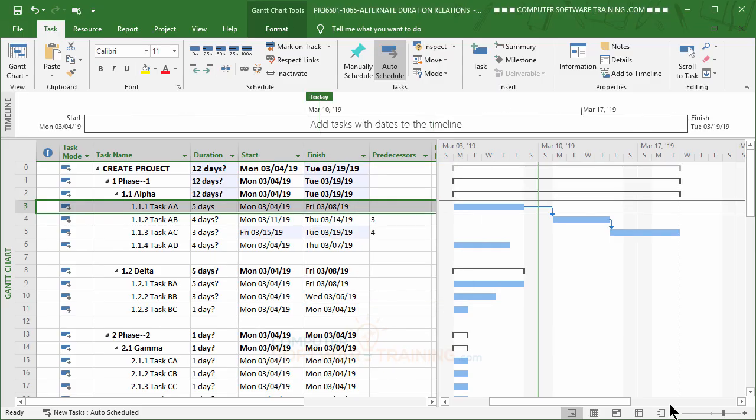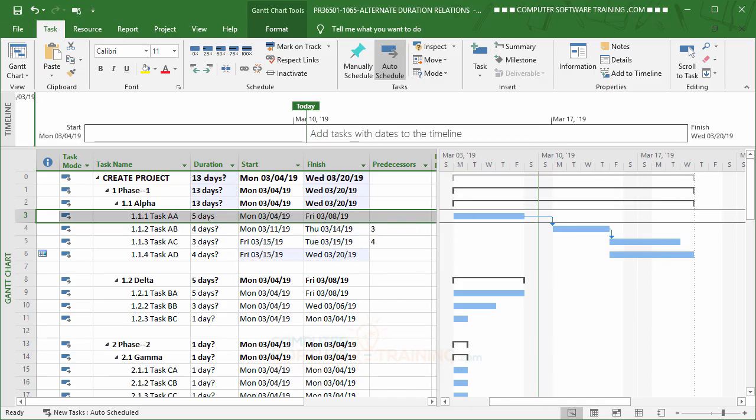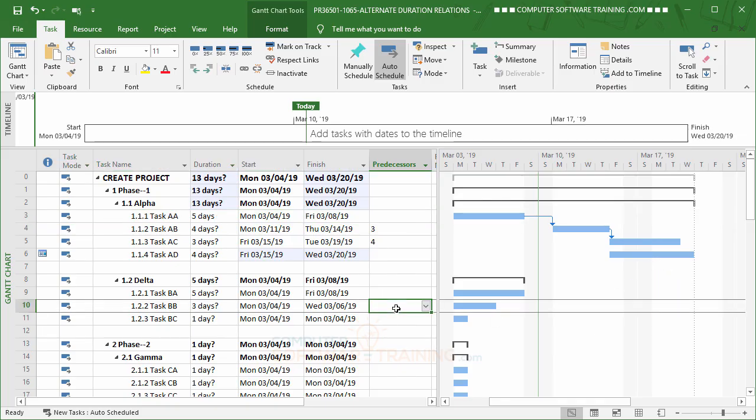Pretty easy. If you do it this way, now watch what I'm doing with this one here. I'm just going to drag this one and just kind of drop it right there. All right. Now what happened there, because I was nowhere near the end of that previous task, it assumed that I have placed that task there, but what it's done, it's created what we call a constraint. Now we'll be talking about constraints in future videos, all right? But let me just point out what happened here.